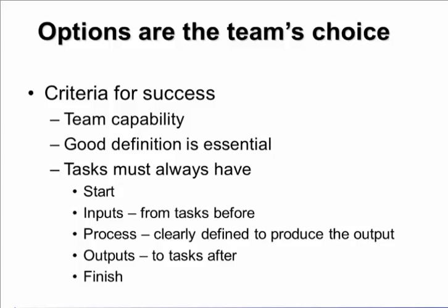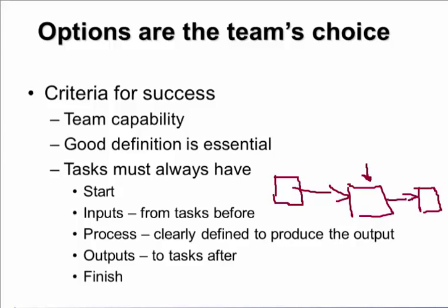In other words, the input comes from the task before the actual task. So no task is ever in isolation. So you do have the task that we've seen. This may be, for instance, an electrical design of the packaging machine. Before that, there would be a mechanical design, and after that, there would be an electrical construction. So you can see that each part will interrelate. Okay, but the process itself is very clearly defined.